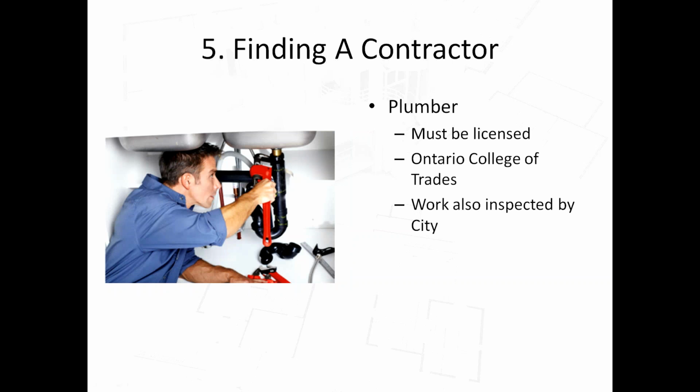A plumber also needs to be licensed. In Ontario, that would typically be through the Ontario College of Trades, so they need to have a license number. Specifically in Oshawa, during the permit application, they actually ask for the membership number of the plumber under the Ontario College of Trades that you're going to hire, and they won't issue the permit until you provide that. I don't know why that's specific only to Oshawa.